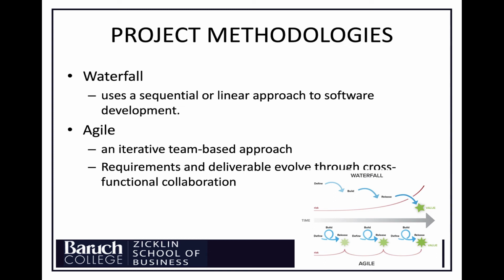But at the same time, what's really common in the industry now is an agile methodology, which is an iterative, team-based approach towards software development. In order to develop a project, the requirements and deliverables are split into a set of functions based on the time it takes to complete them. For instance, we set what's known as a Scrum for like 2 weeks to 4 weeks, and then we set a number of functionalities we can develop through that time period. If we are fast enough, we might be able to add some functions, but we don't change the time aspect of the Scrum in Agile methodology. Same thing, if some of the functions appear to be more complex, we might drop some additional functions.